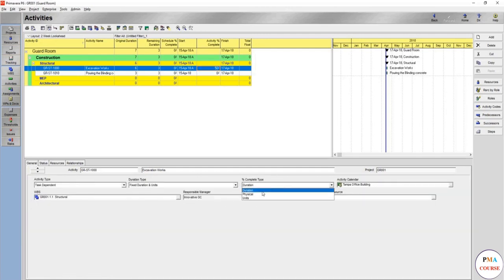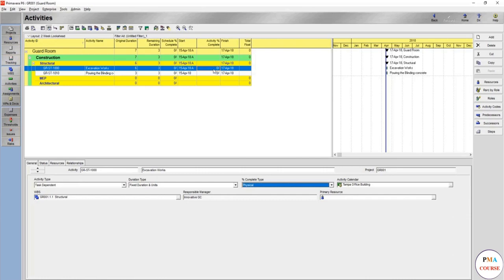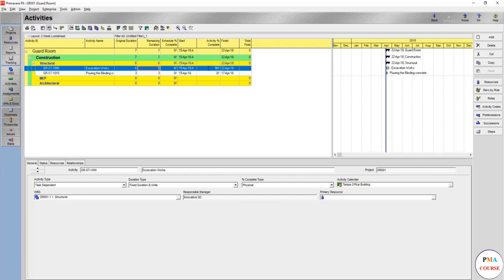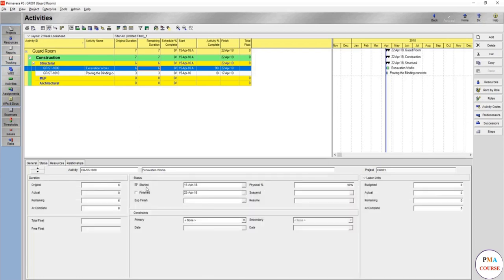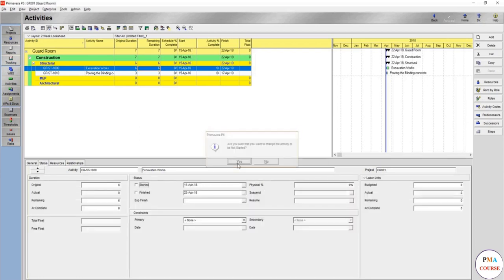While the physical percent of completion, these are independent. By meaning you can say 90 percent, but for some reason it still needs six days. So these are the kinds of the activity. Special units is related more for the resources, so we'll keep it aside for now.